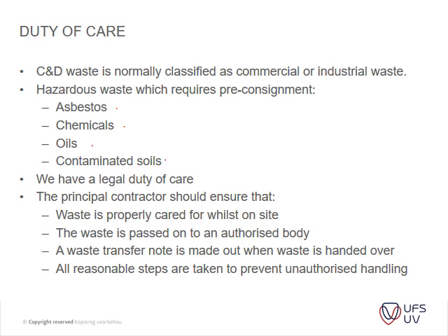So as soon as you're doing the pricing on a project and you see there's asbestos, immediately start asking questions: is there enough money allowed for it? Identify it as a risk whenever you're pricing your documents. Okay, then we have a legal duty of care.